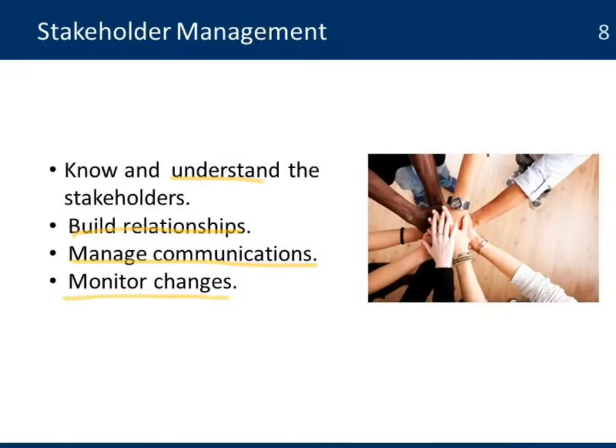And monitor changes. Notice that at the moment you are planning your project, you're using the information that you have at that moment in terms of the level of interest or influence on the project. As you start making progress, some of those stakeholders might change their level of interest or their level of influence. So you need to adapt your strategy again for that specific stakeholder. So it's important to monitor and adapt to those changes.